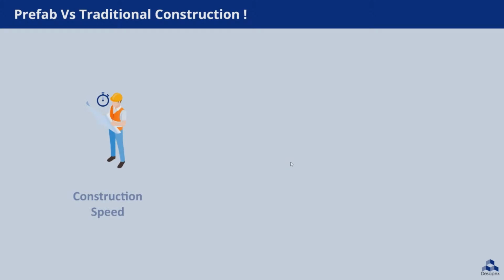Prefabricated construction also has a shorter build time frame. Although traditional construction normally takes 18 to 24 months to complete, prefab can be done in 12 to 14 months or less for a given small building. Almost a 20 to 50% reduction in project schedule can be expected in prefab construction.